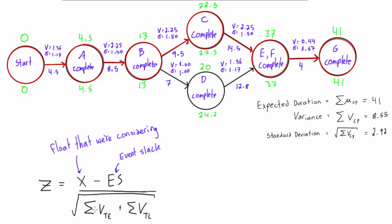Down here on the bottom, this term — the sum of V subscript TE — is just the variance of the path that created the early time. So you sum up all the variances along the path to the early time; for node D complete that would be 1.36 plus 2.25 plus 1. This other term is just the variance of the path that created the late time, so you start at the end and sum up variances along that path — for node D complete that would be 0.44 plus 1.36.